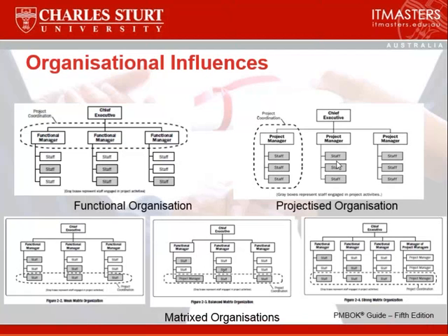The other extreme is a projectized organization, where you actually have project managers who are solely responsible for a project. They may be co-located on a building site somewhere, so they have complete control over what's happening in their project. In the diagram we've got here, you see three different project managers, probably on three different building sites, reporting to the chief executive. You may also have other things, like a human resources department and a finance department, but the idea here is that project managers have most of the power and authority to do things.